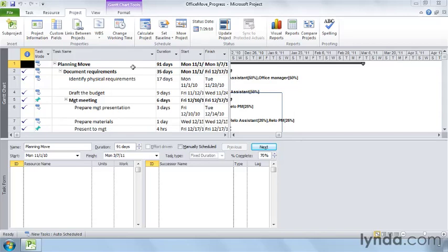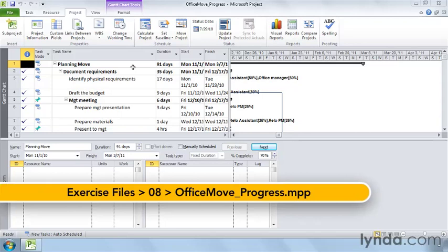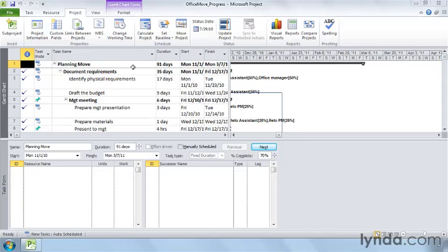Project's visual reports let you change them on the fly because they use Excel pivot charts and Visio pivot diagrams to look at data in different ways. For example, you may start with costs by month, but with a quick modification, you can show costs by resource or by project phase. Generating a visual report is easy.